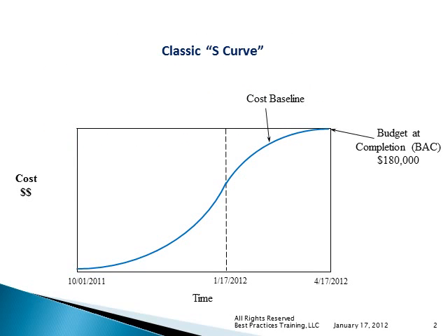In order to use earned value methodology, we have to be able to put together very accurate baselines, especially the cost baselines, very early on in the project. And the best way for PMI to depict our cost baseline is as a time phase budget or as an S-curve. And as we're seeing here for this simple project, which is starting on October 1st of 2011, it's going to go until the middle of April of 2012.